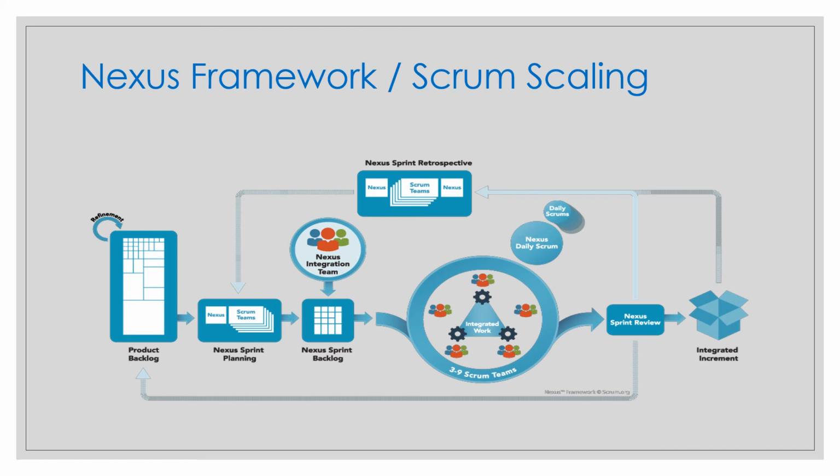Another way around, a component team, a layer of the component, is just one part of the product that is responsible for performing a certain duty. For example, a user interface handles the interaction with the customer and sends any input to the next layer. So a layer team is focused on a single or multiple components of the system. A component team alone will typically not be able to deliver new functionality. Using component teams increases the dependency between teams, and at the same time reduces the chances of producing an integrated product increment by the end of the sprint.